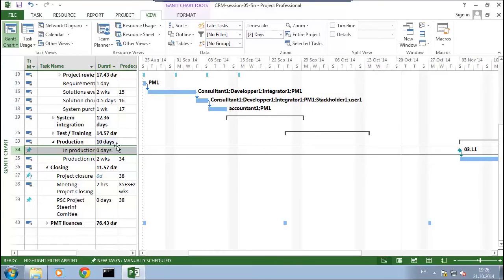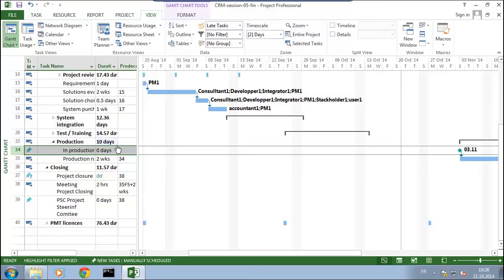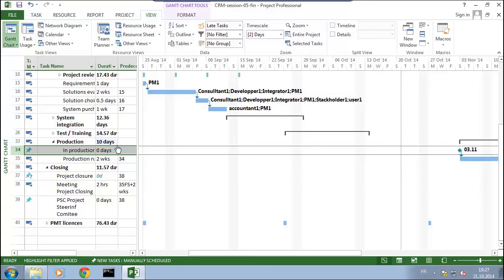Sometimes there's a task that needs to be done before - deciding whether we're going to go to production or not. If we want to be in production on the 3rd of November, it may be good to set the date when we decide. I propose we set that date two weeks before. To do that, I'll add a task.